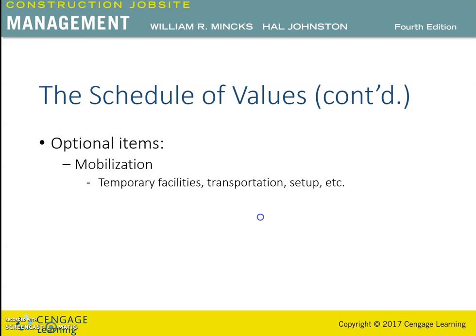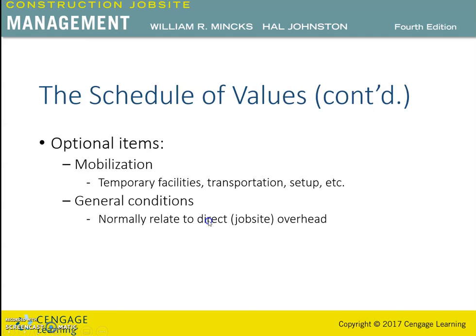Some of these initial costs include immediate payments required for performance and payment bonds, builders' risk insurance, and building permits. Some contracts treat the building permit as a reimbursable cost paid by the owner when incurred by the contractor. And some owners refuse to pay for the performance bond initially and feel that it should be distributed evenly throughout the contract.